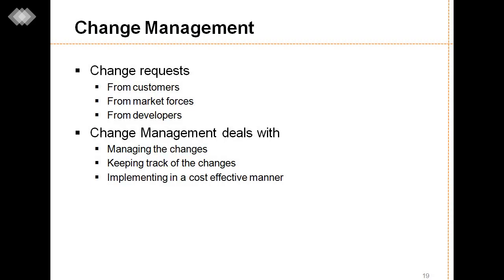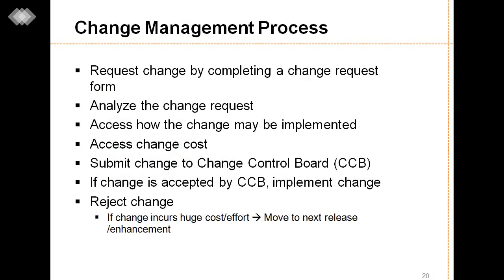Change management also deals with managing the changes, keeping track of the changes and implementation in a cost effective manner. Also request change by completing a change request form, analyze the change request, assess how the change may be implemented, assess change cost, also submit changes to the change control board, that is CCB.